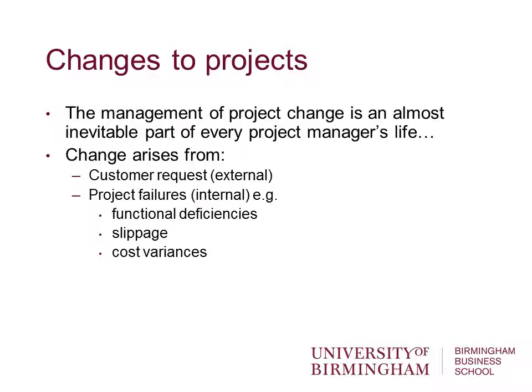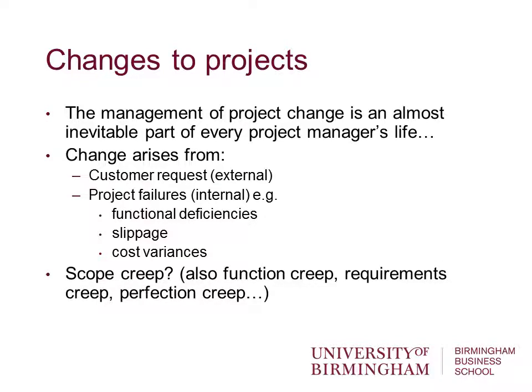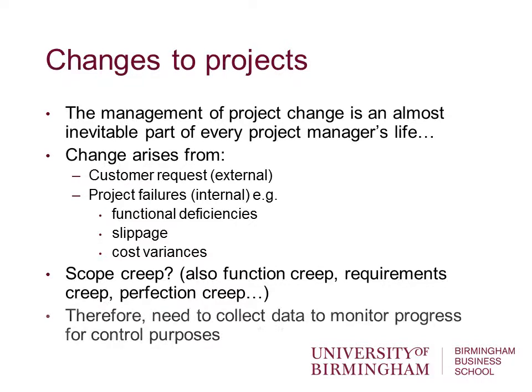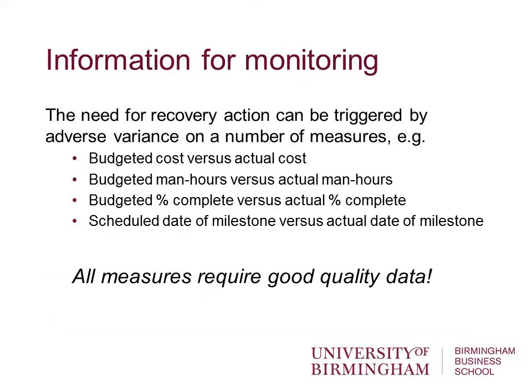Changes come from all sorts of sources: customer requests, which are normally external to the project; project failures of various sorts, such as functional deficiencies, slippage, cost variances; and also scope creep is a major factor, as we've seen in some of the examples we've looked at. So what project managers have to do once the project commences is collect data. Collect data to monitor progress, to control the project.